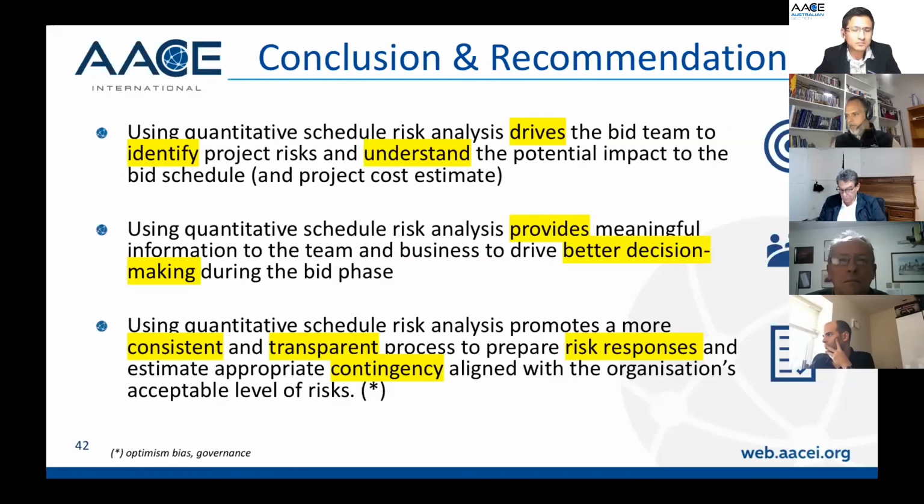Something that you also need to have a look at is the potential impact of COVID-19 on the subcontractors and the suppliers. So what if one of the subcontractors goes into bankruptcy during the delivery? That's a big question, what are you going to do with that? Again, it depends on the client, how you can assess this. What I have done is look at the potential impact on productivity at least during the next 6 months, and then we can take it from there.